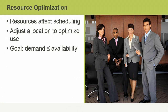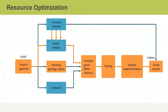Resource optimization can also involve increasing the estimated duration of an activity because of a resource constraint — for example, based on the earliest date when required equipment can be delivered. Resource optimization is all about moving resources from non-critical to critical activities and can help reduce a project's total planned duration.